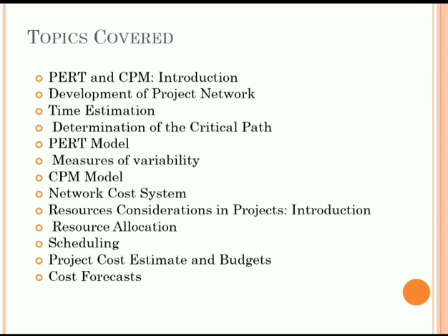Communicating with the stakeholders is the process of developing an approach to communicate with the stakeholders efficiently and understanding their different requirements. The input for this is the project management plan, stakeholder register, enterprise environmental factors, and organizational process assets. The output is the communication management plan and project documents update.